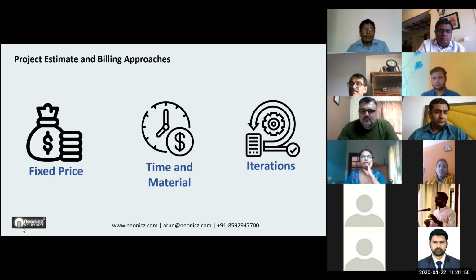You are not sure about how much time it is going to take. You don't know how many resources you need. You don't know how much time it is going to take to launch the product. In that case, you're unsure about that. Then the best way to start with the project is time and material. You give one requirement and ask for the estimate. Only that particular, very simple module, we will be asking.